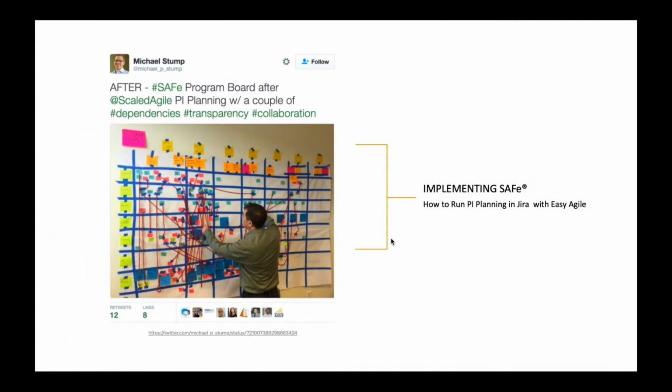During this time, product managers set the program vision in the shape of top-of-mind features, and teams identify and plan work to support the achievement of those features. Once work is planned, product owners and their development teams identify cross-team dependencies, which are communicated to the ART using string on a physical program board, which is normally called a spaghetti board.